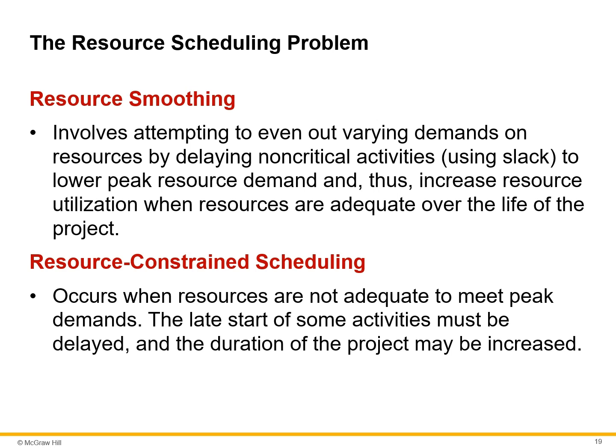One research study of more than 50 projects by Woodworth and Wiley found that planned project network durations were increased 68% when resources were scheduled. The consequences of failing to schedule limited resources are costly, and project delays usually manifest themselves midway in the project, when quick correct action is difficult.